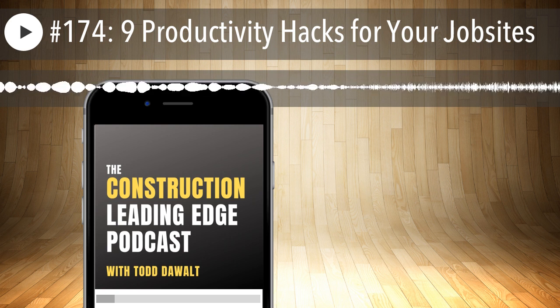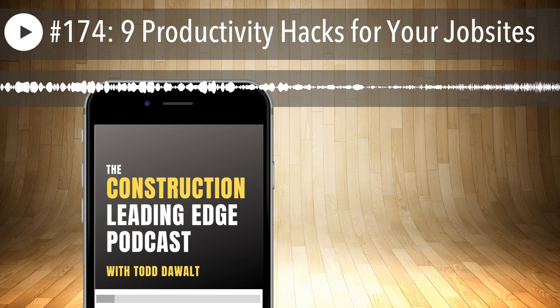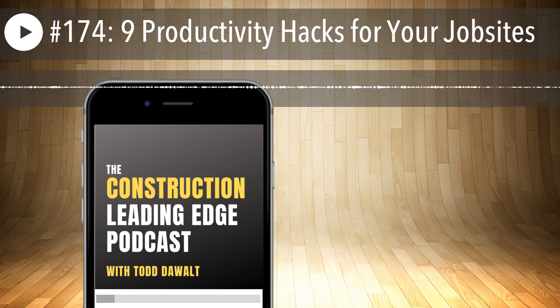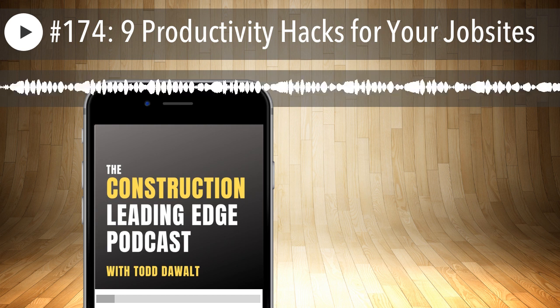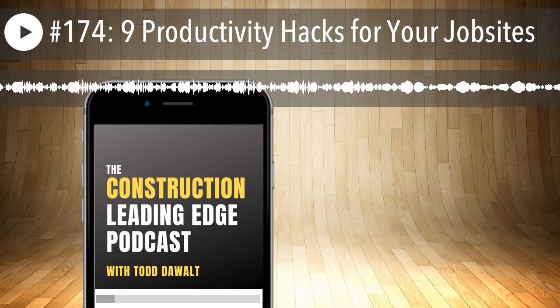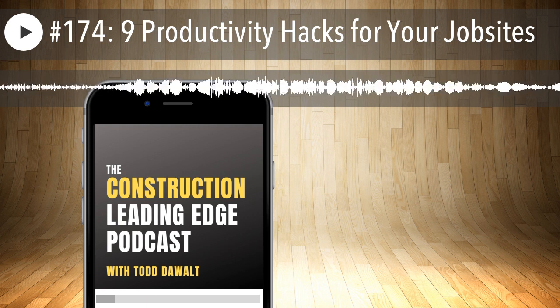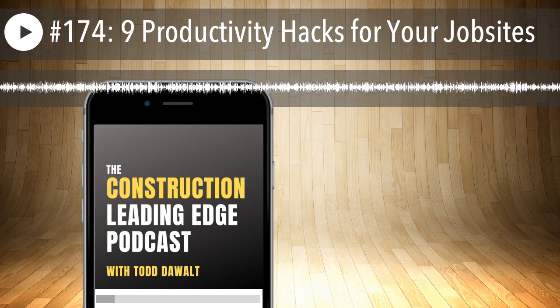In fact, when somebody comes to me and says, Todd, my cash flow is bad, I'll ask, do you have employees that are self-performing work? Are you putting work in place? And if they say yes, my number one piece of advice is get out of stores, because that's a cash flow killer. It just causes all sorts of problems. Your people, if you're picking up materials at 8 o'clock, 8:30, 9 o'clock in the morning, or running to the supply house to pick stuff up, or gassing up your trucks at 8, 9 o'clock in the morning when you could be doing revenue-producing work, you're getting hammered by opportunity. Not only the cost of having people on the clock doing that stuff, but what you're really getting hammered with is opportunity cost, which is the missed revenue that you could be bringing in with that time.